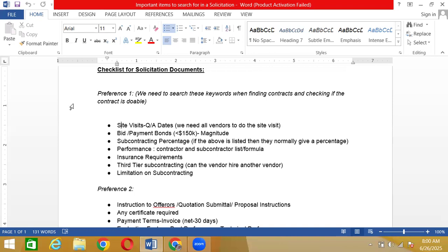Second, it is not mandatory by the government, it is encouraged, but we as KSNL make it mandatory for the vendors to go to the site visit. If they don't go to the site visit, we do not use that vendor. We use the other one that went to the site visit. Okay? That's how it is. So, site visits, two cases were talked about.